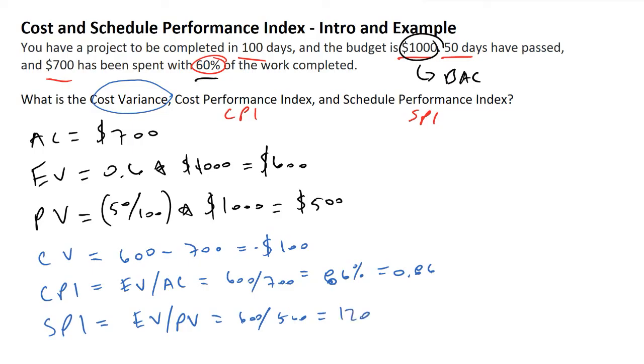Which is also equivalent to 1.20. And so what this means, what our Schedule Performance Index is telling us, because it's greater than 1, means that we're ahead of schedule. So in this scenario, we are ahead of schedule, but behind schedule in terms of how effective our dollars are being spent.